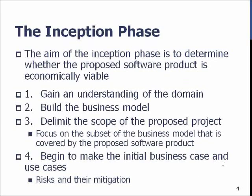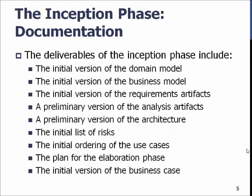After that, we make the initial business cases, use cases, and start drafting class definitions. The deliverables of the Inception phase are: the initial version of the domain model and business model, the different requirements, a preliminary version of analysis artifacts and architecture, the initial list of risks, the initial ordering of use cases, a plan for the Elaboration phase, and the initial version of the business case.